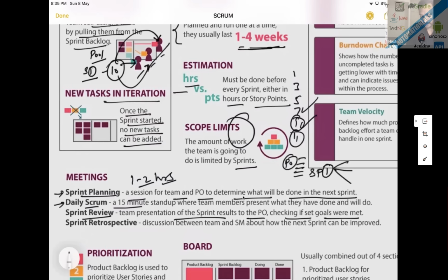Tasks were assigned on 1st January, right guys? And today is 15th January. We have to give a demo to the client, and the client means the PO for us. QA or dev will decide, okay, this is the sprint we have covered and these are the features we have completed. These are the task demos I'm going to give to the PO. We check that all the acceptance criteria, the requirements and goals were met or not. That is called the sprint review.